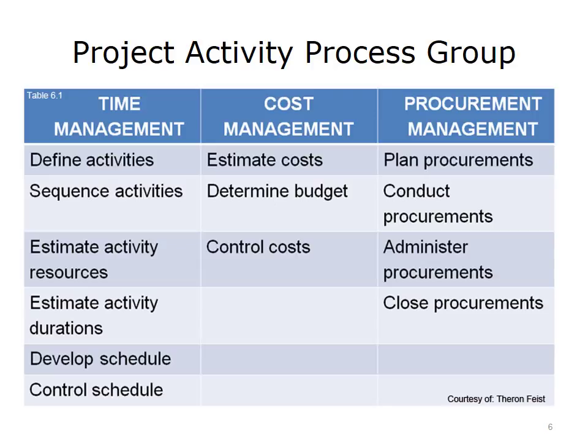A variety of activities will take place when developing time, cost, and procurement management plans. This table illustrates how these activities break down across the different process groups. When developing a time management plan, first define all project activities, then sequence these activities, estimate the activity resources required, estimate the duration of each activity, develop a schedule, and then control the schedule. In the cost management process group, estimate costs, determine budget, and control costs. The activities in procurement management involve planning procurements, conducting procurements, administering procurements, and closing procurements.